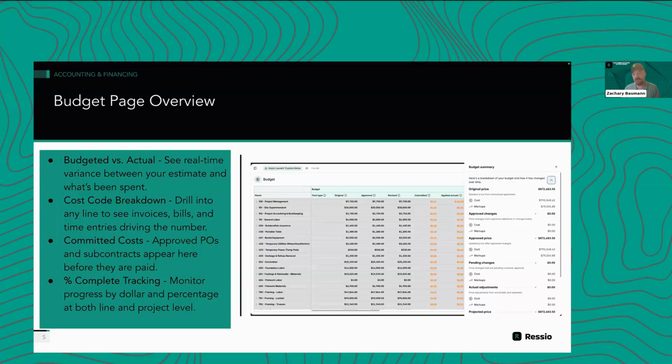Like, that might be information that's just way too overwhelming for them. A couple of terms to break down here. So we've got what I call the five main concepts that tend to be on the left-hand side and are often repeated in the budget table. And that is original, revised, approved, committed, and then actuals. And there's two designations for actuals sometimes.